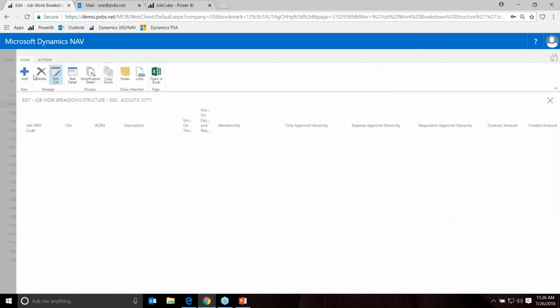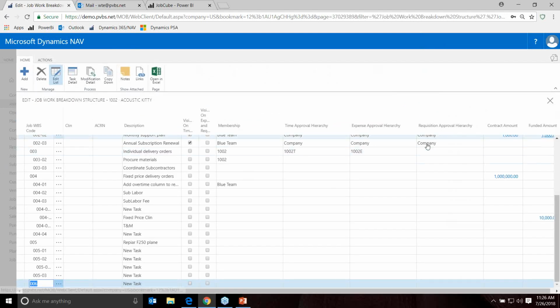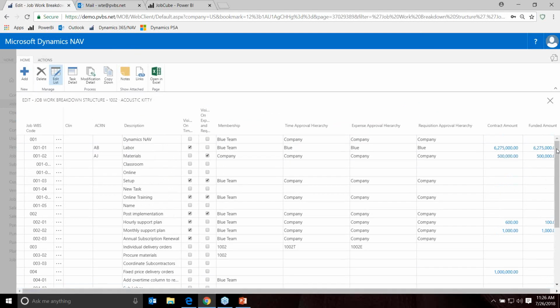And then at the lowest level is this work breakdown structure, or WBS. So the WBS allows me to have multiple levels underneath any particular task. It's a 60-character alphanumeric field, so whether you're going 10, 15 levels down, it's not a problem. This WBS is used for 4 key purposes. Number one is I'm defining that structure, and I'm telling the system, giving a little description of what that level is.